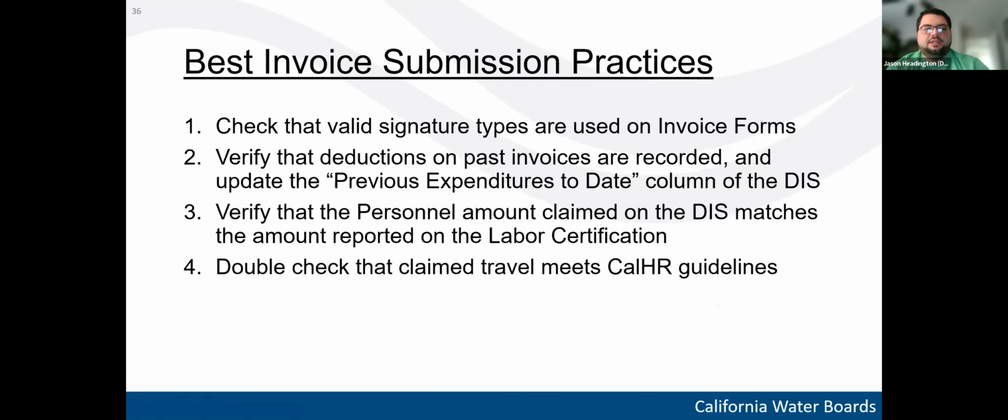And then finally, I wanted to end off with some best practices when submitting invoice packages. So first, just check that the valid signature types are used on all the invoice forms. And if you need a reminder of what those are, you can reference back to this PowerPoint slide, and it will have the different signature types that are accepted for some of our different invoice forms. Second, verify that the deductions on past invoices are recorded and then updated for your next submission.